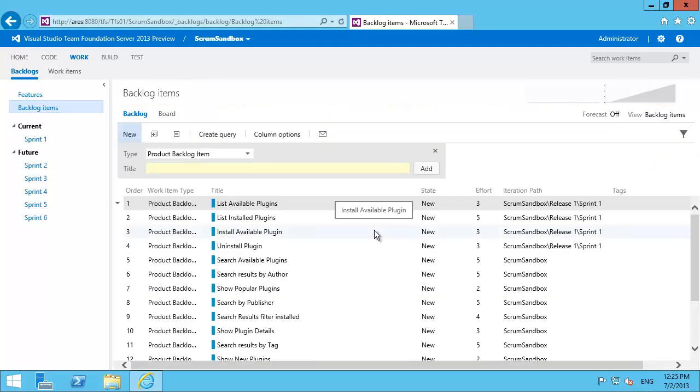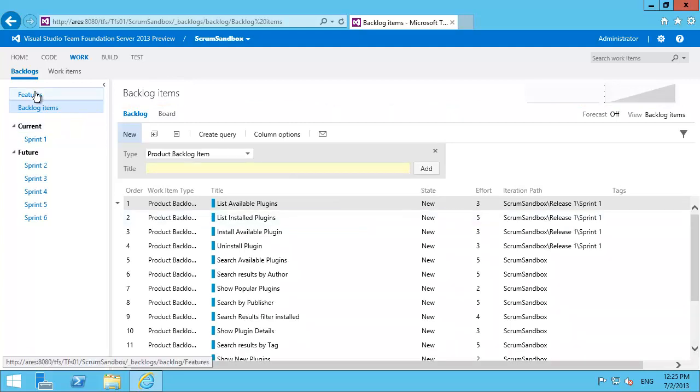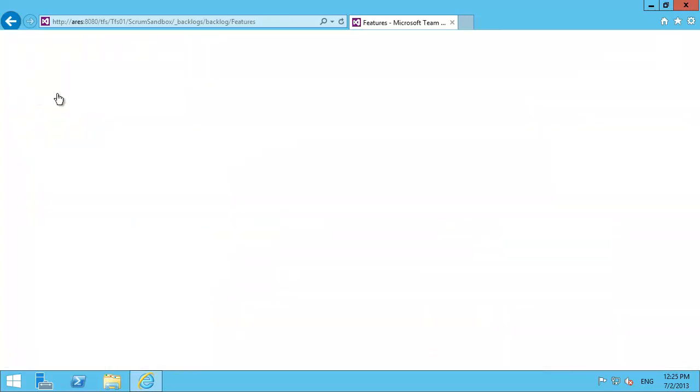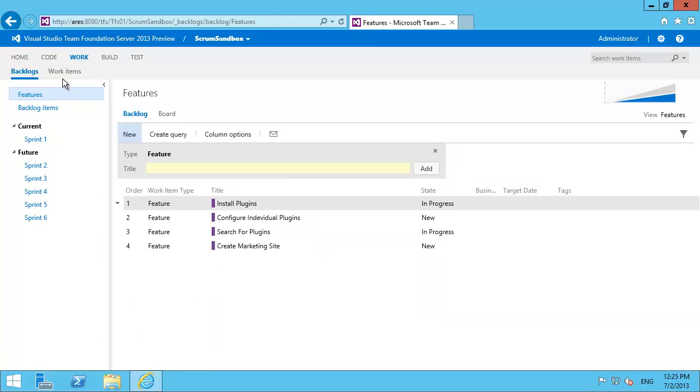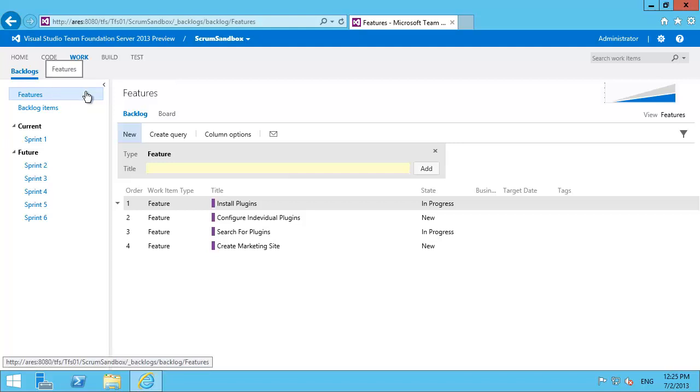Now we can customize this and add additional hierarchy to our items. Here we've got features. We might want to add an item above this called goals. In order to do that there's some XML editing to do loading into TFS to achieve that.